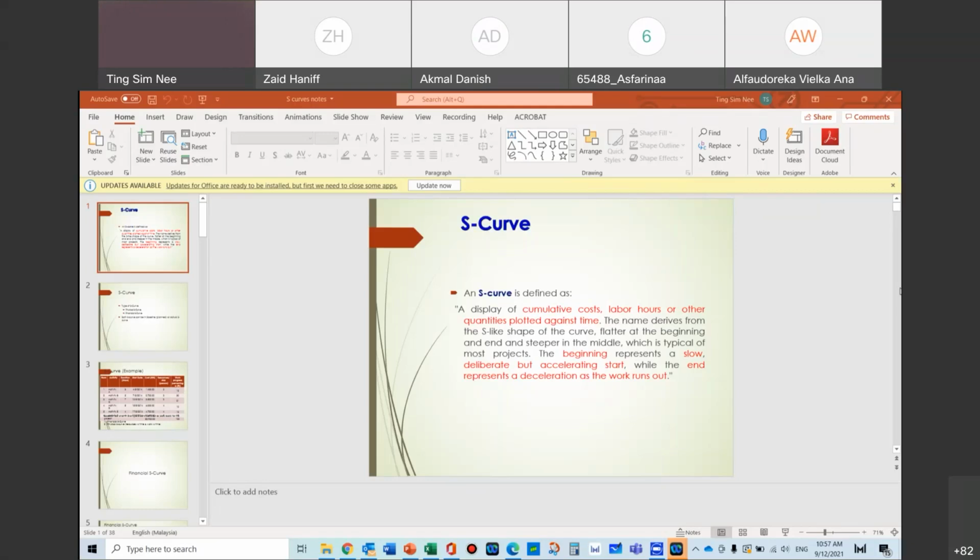Once the numbers change, that will be the final fixed number, and you multiply it with the rate that is given to you, or that you found out, whether it is JKR or contractors, or your experience: your actual rate of labor, your actual rate of material, your actual rate of machineries. And this is not all up, this is really every single one. If you have one carpenter, you multiply by the time he is working, times the rate per day, one by one. That is how we calculate your detailed cost calculation.